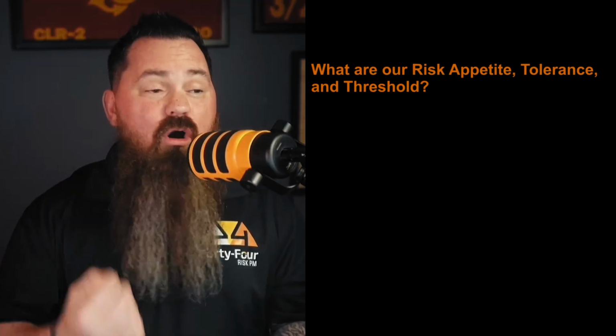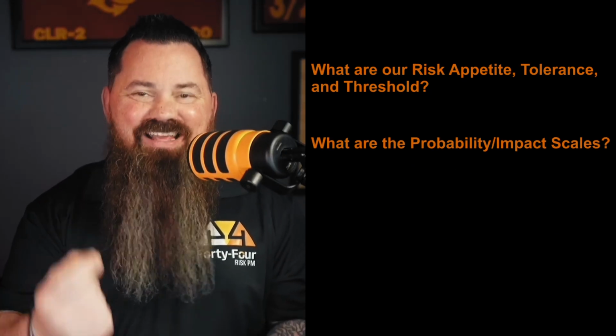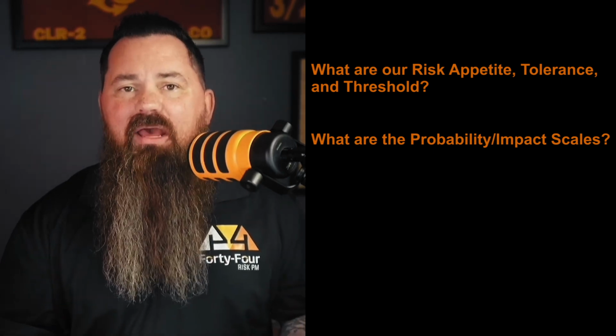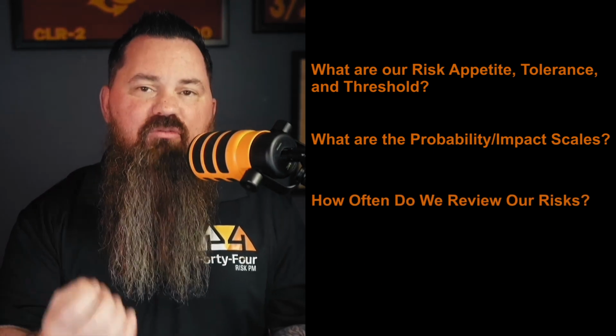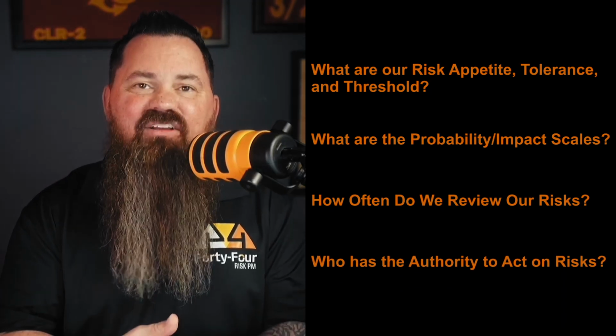First, what are our risk appetite, tolerance, and thresholds? 2, what scales do we use for our probability and impact? 3, how often do we review our risks? And 4, who has the authority to act when it comes to risks? It's important to note here that the risk management plan is a part of the entire project management plan. And PMI is going to test whether you know it lives within the overall plan structure.